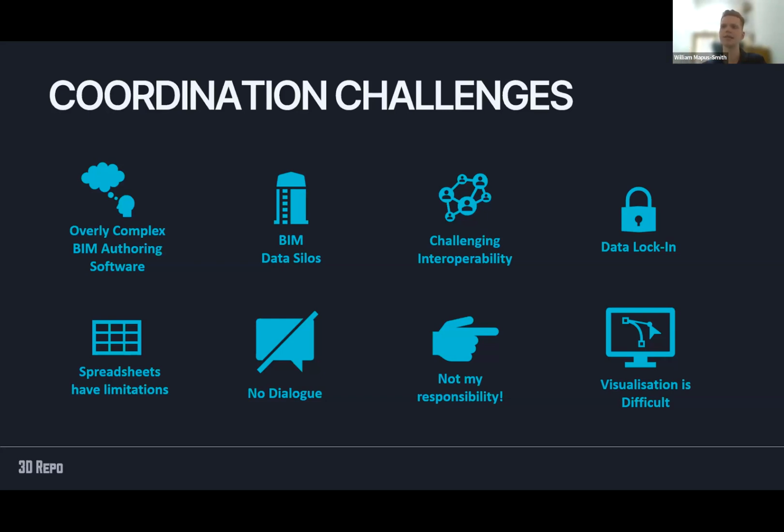Now, responsibility. This is a huge issue when it comes to hazard mitigation, and that's who's actually responsible for ownership and mitigating certain risks. So if no one's taking responsibility, then this increases the chances of hazards being missed and then incidents occurring on site. So having that clearly defined audit trail of who's responsible for what, who said what, is critical on projects.